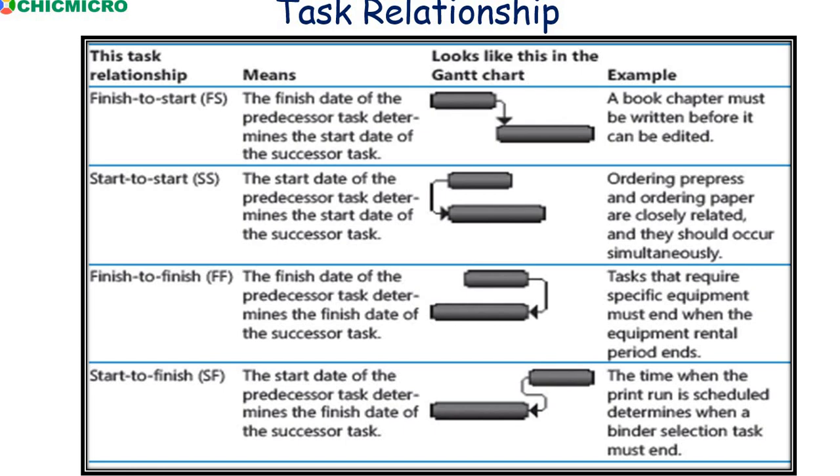It means if you are working on a construction project, for example, we are flooring. If you're doing flooring and at the same time as we floor, we pour the concrete and the concrete is going on, we also level it. A different person is doing it. The machine is pouring the concrete and the roller is leveling. So they finish at the same time. So no one is waiting for each other.